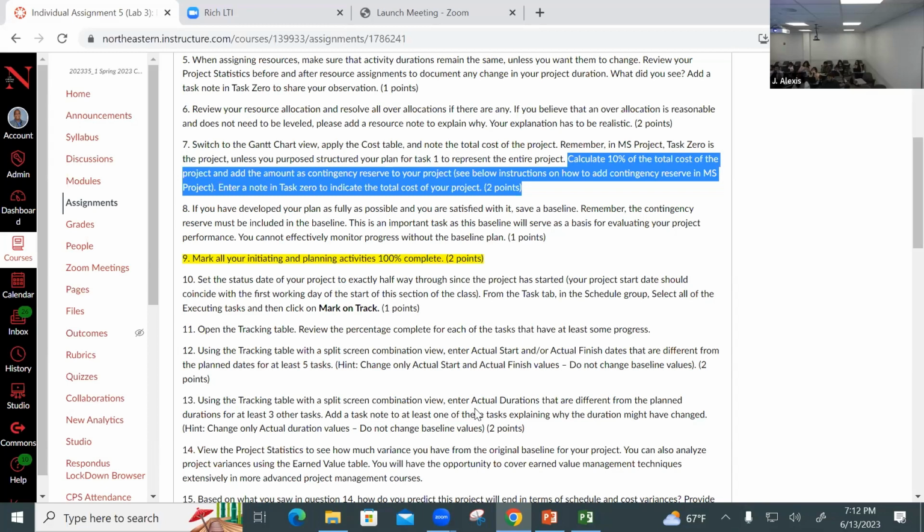Contingency is the last thing you do. So whatever amount we got, 10% amount, we have to assign that amount to the contingency activities. Yeah, where you think you're going to need the contingency. So the contingency part is a final part of all the activities. Yes, the cost baseline is the cost of the activities plus the reserve. Does that make sense? So that's what it means.